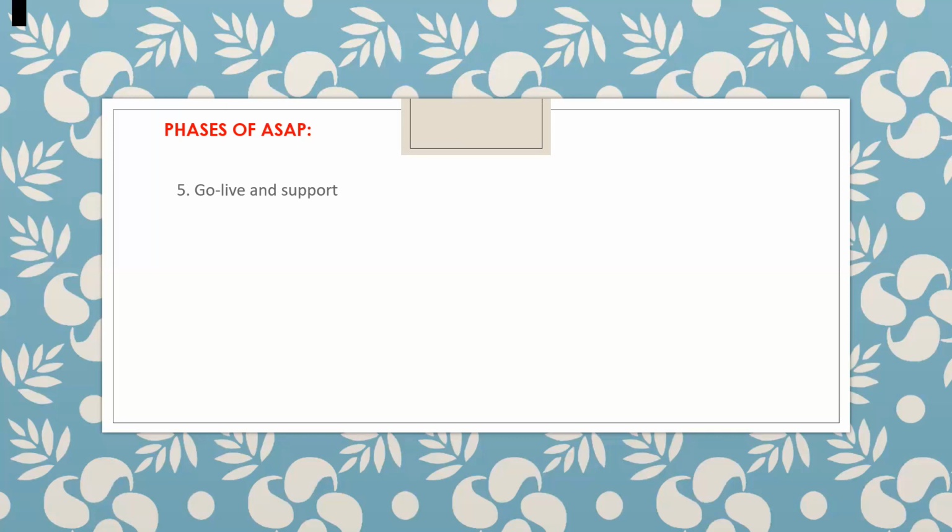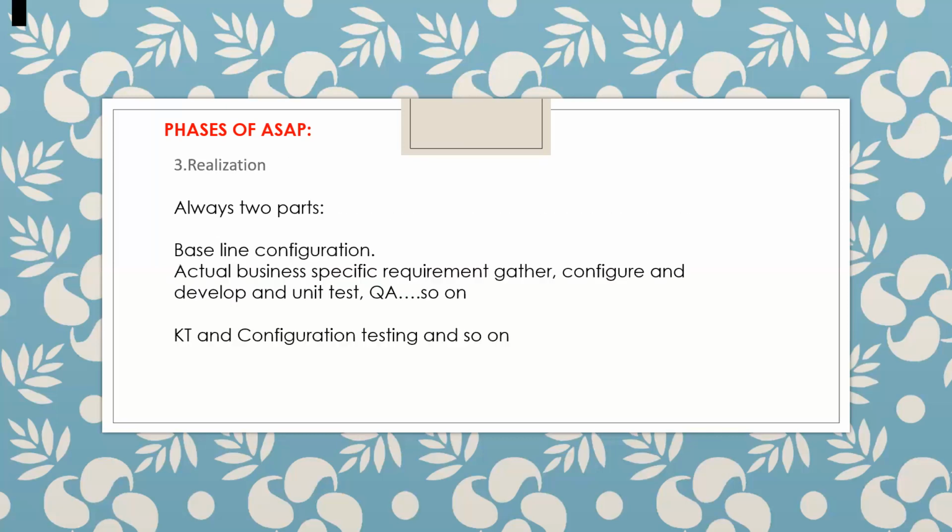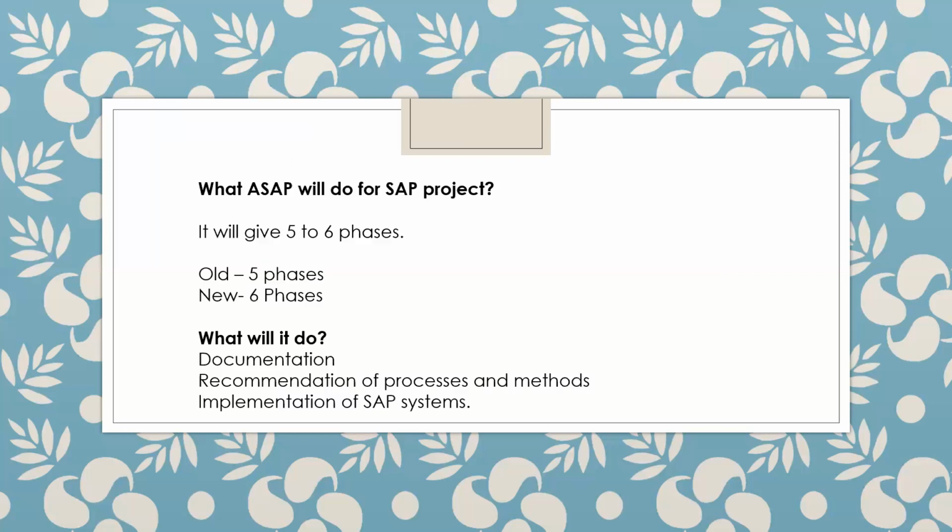Nowadays in projects, if you are doing configuration, testing is happening in parallel. If you are doing integration, testing is also happening in parallel. Suppose you are doing configuration, then you go for integration, and configuration is fine. In integration you come to know that something fails, then it is rolled back to the respective team to fix the issue. So when you come to the final go live stage, it should be 100% quality. By UAT time, you will have minimum defects. So that exploring phase will be there in parallel. So this is all about your SAP methodology.